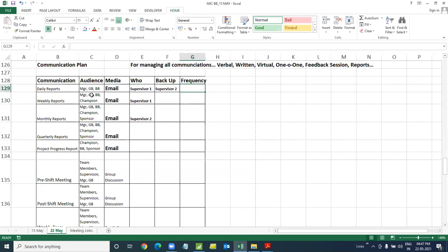Now, frequency, at what frequency do you need the reports? Daily reports, well, then daily by say 9 a.m. I should get this report. Weekly report, well, I should get it by 1 p.m. But what day? Weekly, you want to wait all day? No, say Wednesday. Every Wednesday, the report will be published. So don't come back on Tuesday asking for a report. It's going to come out Wednesday and by 1 p.m.